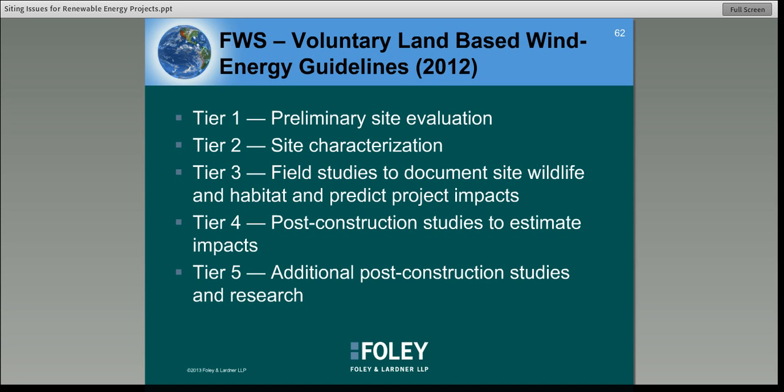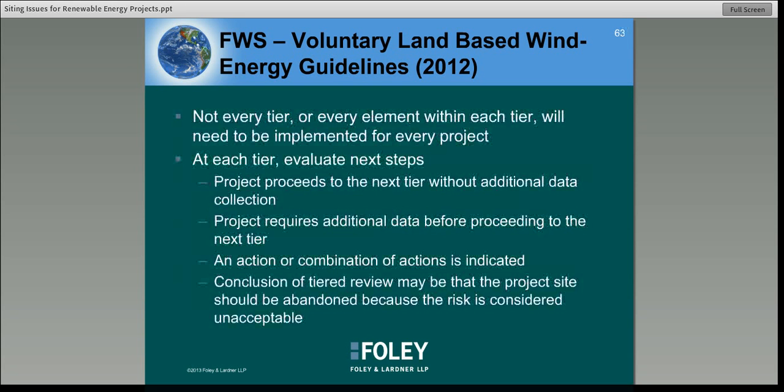And just to make sure everyone understands, a project means all phases of a wind energy development. So what needs to be analyzed is the site, the construction, the operation, the decommissioning, the infrastructure, and even the interconnection with the electrical lines. That's all part of the project. And then the project site is the land and airspace where the project occurs. So it's a pretty big area that needs to be assessed.